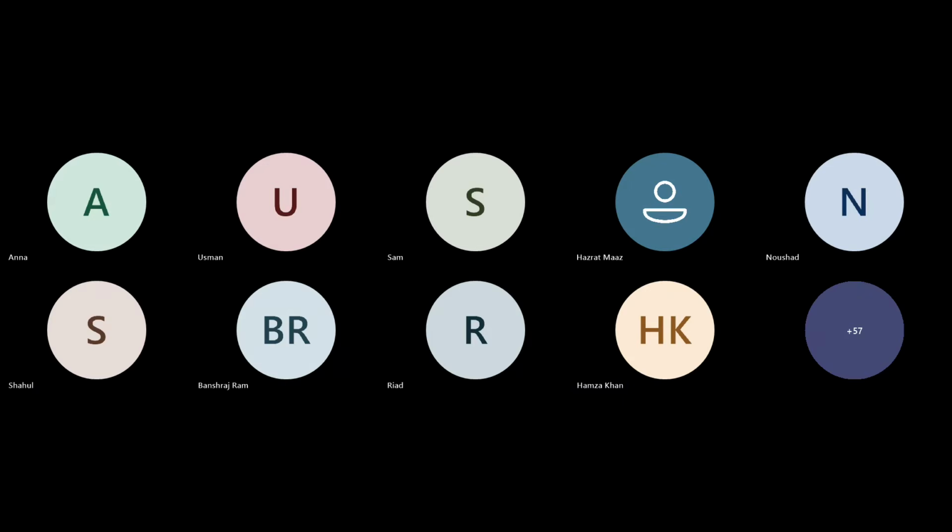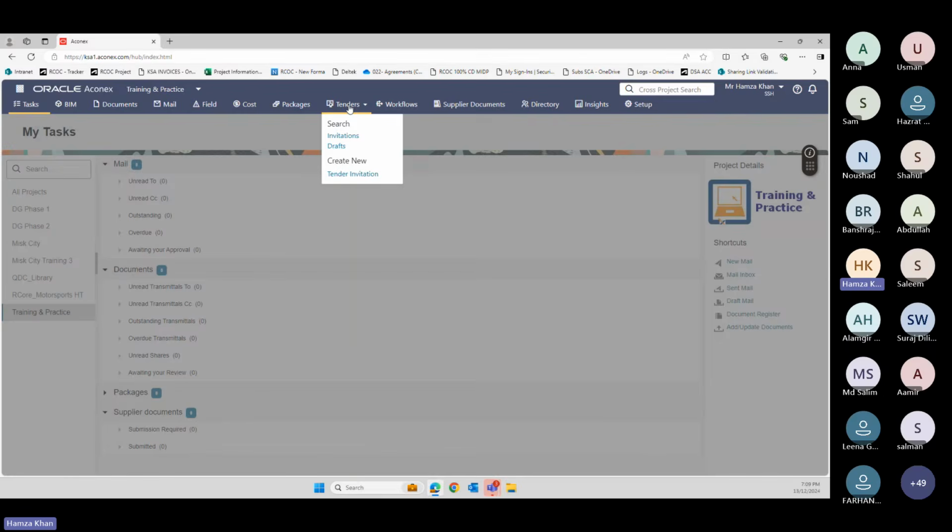Tender is a part that comes before your project starts, before the awarding of the project. Let's say I'm going to bid in a project, but before bidding, I need some tender documents from the client. Once that is done, the client will issue their tender documents to us. Based on those tender documents, the contractor or the consultant or the supervision consultant, anyone, can bid.